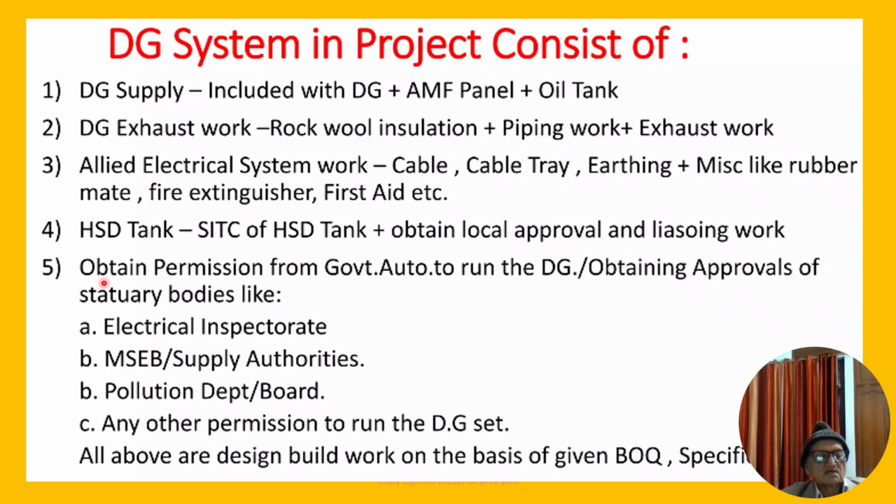First, obtain permission from the government. Obtain statutory approval from bodies like the Electrical Inspectorate, State Electricity Board, supply authorities.